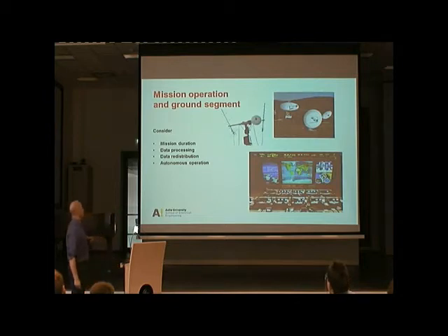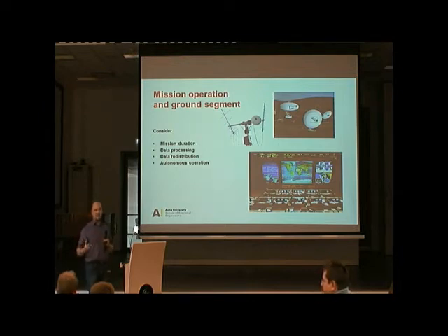And then mission operation and ground segment. So people often start to design a satellite not thinking how much the operation actually costs. As I said, the design and building of the satellite takes almost the same time as actually operating the satellite. And often operating the satellite might be almost as expensive as actually building the satellite.